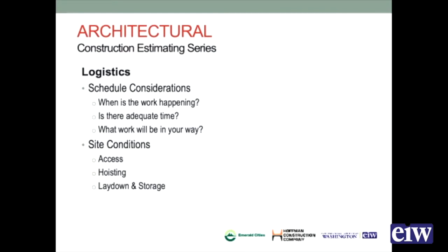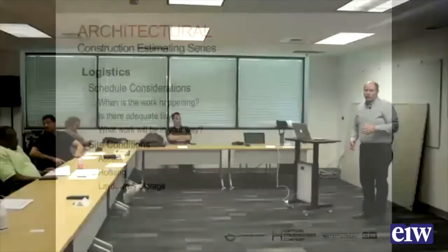Yeah, and that's going out and walking the job, too. Especially if the general contractor is staging the bids and you're down at the end, so they're bidding the work out towards the end, you may have an opportunity to walk the job while it's being constructed. You'll be able to walk in and see, okay, that didn't seem quite that high on the plans, but I'm going to need some scaffolding here. So those are things you need to think about as far as how do I massage this and make sure that I'm accurately pricing out what it's going to take to install the work.